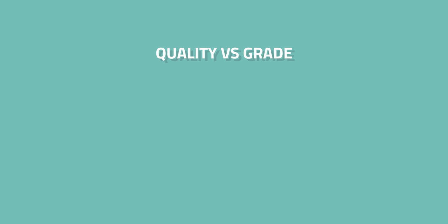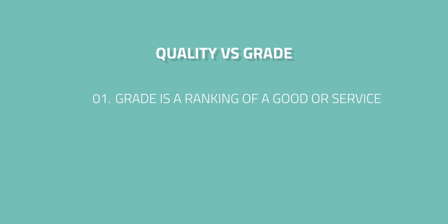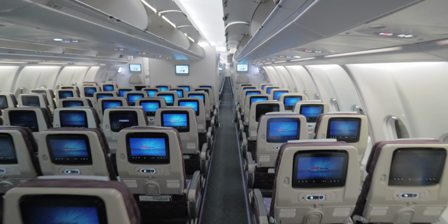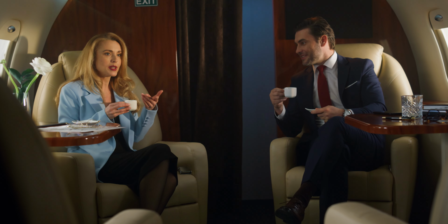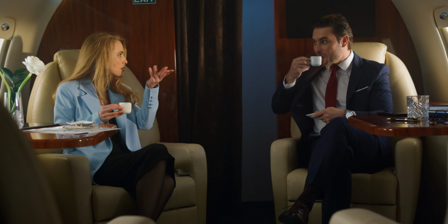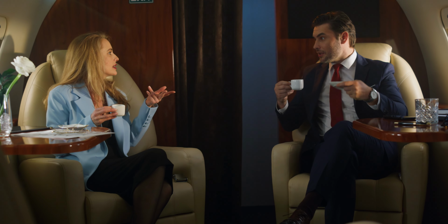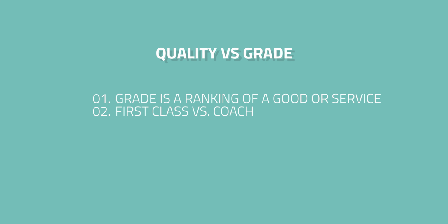Sometimes people mistake quality and grade. Grade is really a ranking or a classification of a good or a service. So for example, first class versus coach. You can have quality in both of those. The experience is not the same, the service is not the same, but you're paying for a higher level of grade or a lower level of grade. Low quality is always a problem. Low grade may not be.